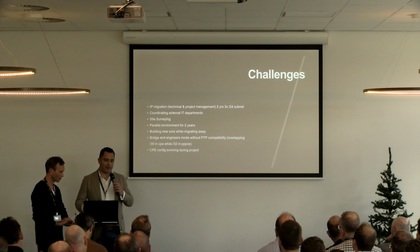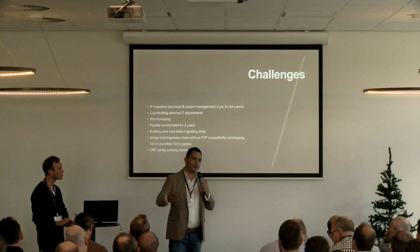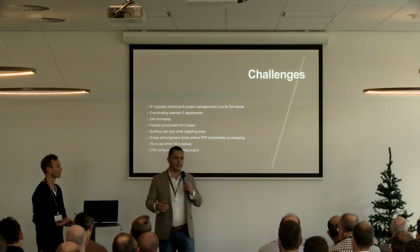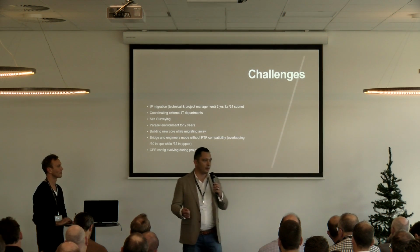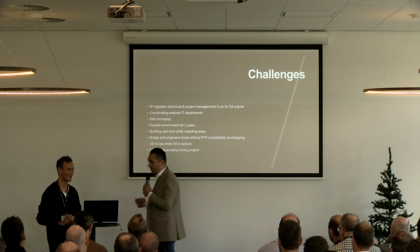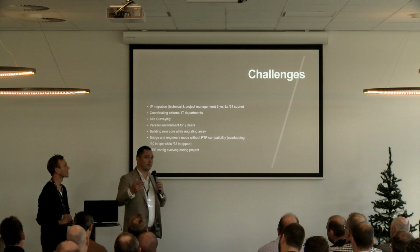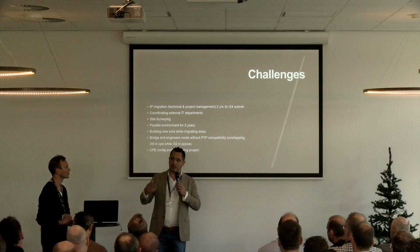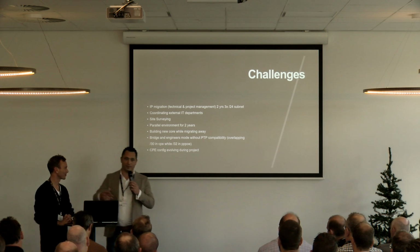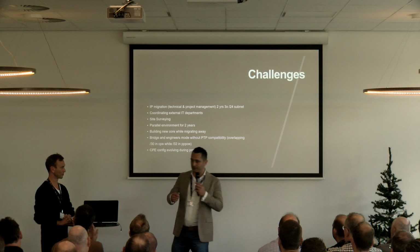Obviously, a lot of site surveying. You have to make sure when you do these types of migrations that you really know what's happening in the network of your client. And then always the question, when does our responsibility stop, and when does the client take over? Particularly when you're working with very, you can say stubborn, or you can say knowledgeable network teams. The communication is sometimes a bit difficult, particularly when you're talking about time zone differences. So definitely communicating and making sure that all your documentation is in place. That's something that we've learned. And I think we're now into the 15th iteration of our documentation to clients to really make sure that they know what they can expect.